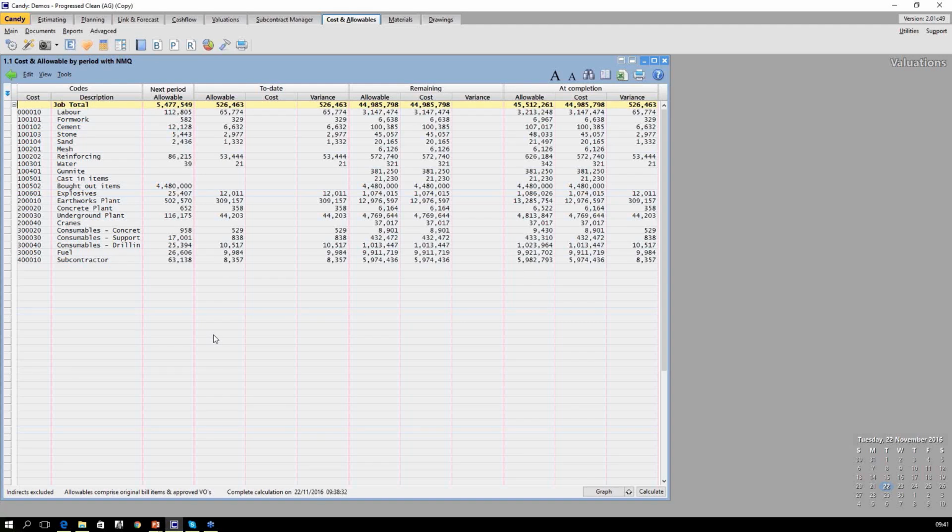Excellent. The last one we're going to have a look at is our expected man hours for the month. We've already spoken about next month resource usages, which will indicate how many hours per labor resource we need. If we use production codes, we can combine these hours into a man-hour total. We can then use the man-hour column to depict how many hours we require per task for the next month.